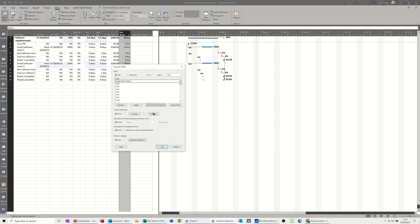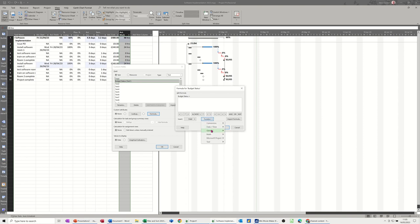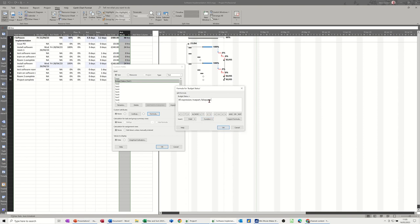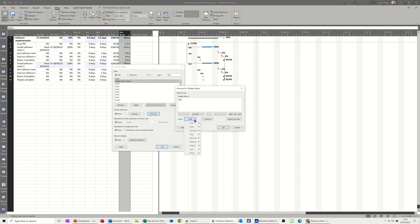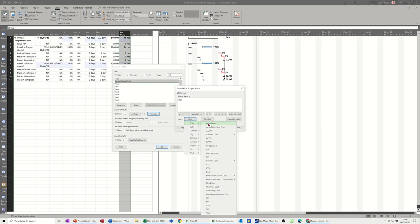And then I want to go to formula and I'm going to do an immediate if. So basically that's in functions and then it's under general and then this one. So a basic if statement, as in Excel and other programs, has three elements: a test, what to do if that's true, what to do if that's false, separated by commas. So the test for this one is going to be to do with costs.